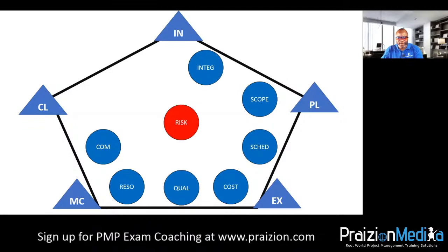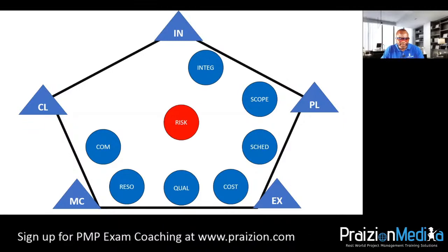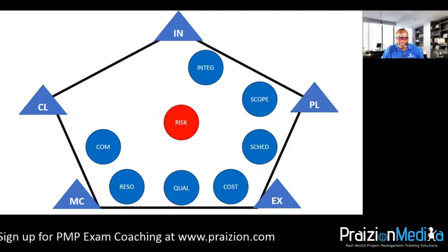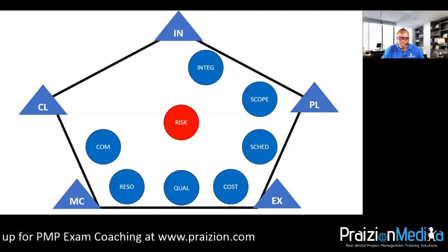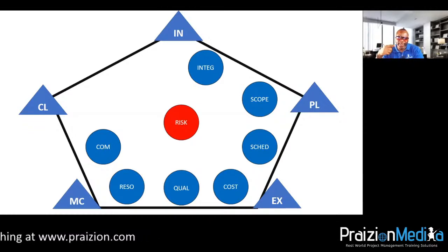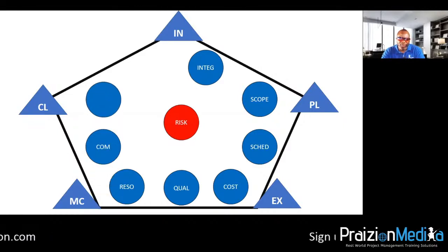Agile in and of itself is a risk coping mechanism. It says, high variability environments by definition incur more uncertainty and risk. To address this, projects managed using adaptive approaches make use of frequent reviews of incremental work products, and cross-functional project teams to accelerate knowledge sharing and ensure that risk is understood and managed. We're constantly thinking as product owners, how do we prioritize this backlog? How do we inject considerations for risk? That's why we talk about a risk-adjusted backlog and so on. This stuff has not gone away.